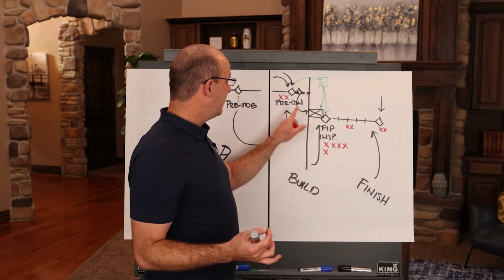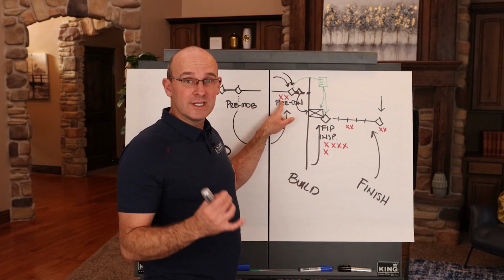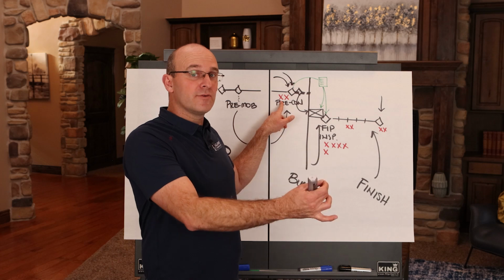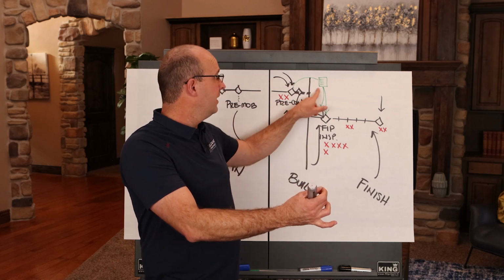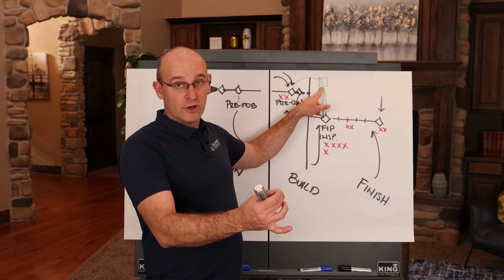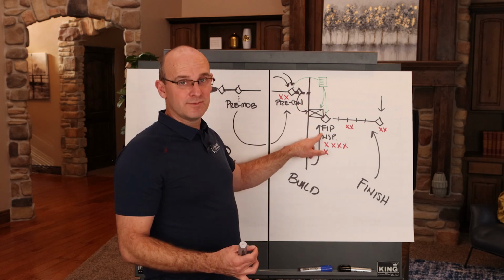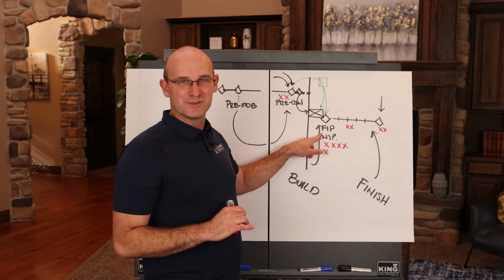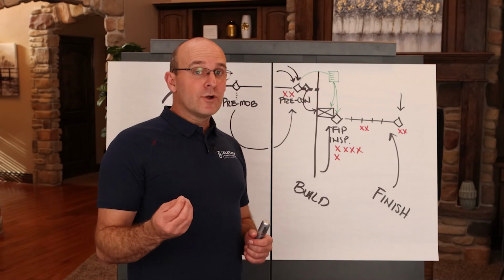And so when we do that, we're able to, in this meeting, really assess, well, hey, how are we going to prevent that mistake from happening in the future? That goes on to our quality feature of work card or board, and then gets inspected in the first in place inspection. Number 7, rework can happen because of having different versions.